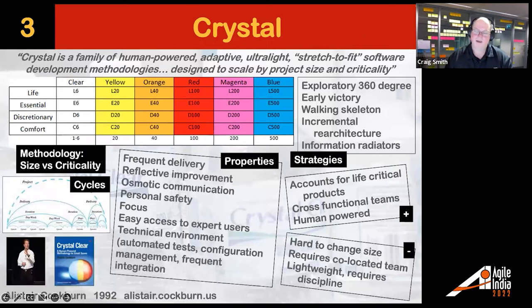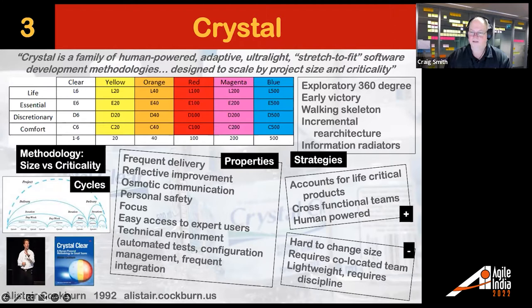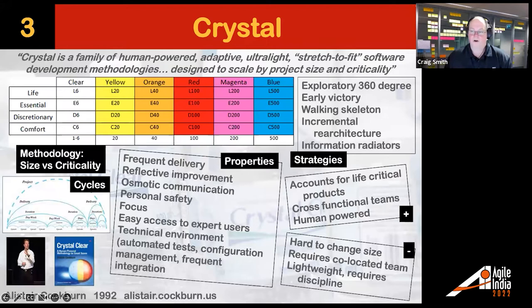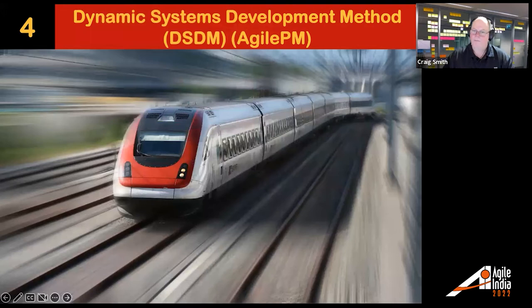Crystal is the work of Alistair Cockburn, going back to the early 1990s, popularized by his book Crystal Clear. It was supposed to be a set of books — Crystal Yellow, Orange, Red, Magenta, and Blue — where depending on team size and the type of work (comfortable, discretionary, essential, or life-threatening), you'd use a different flavor of Crystal. You might not see it much now, but concepts like frequent delivery, good technical environment, and cross-functional teams have roots in Crystal Clear.